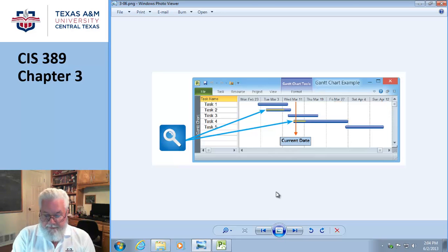So it's got to have a task or an activity, which is any type of work that has to happen. Typically that means it has an estimated start and a duration, or an estimated end date and duration. Rarely do you use all three.